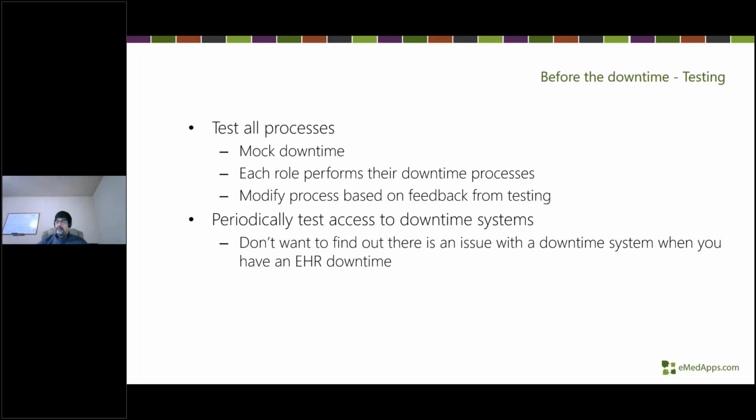How often should they test it? That's a good question. We certainly would recommend testing systems at least on a quarterly basis, so that you know that your systems are available and they're functional. For your entire downtime process itself, that's certainly not something that you need to do on a quarterly basis. An annual basis is usually sufficient to make sure that those processes are good and functioning properly.